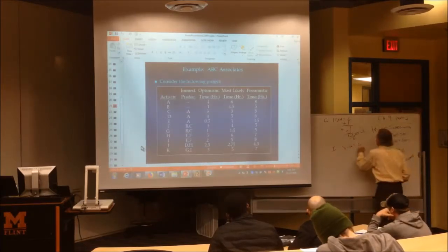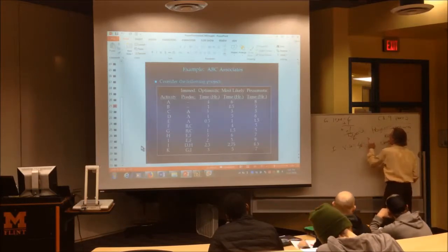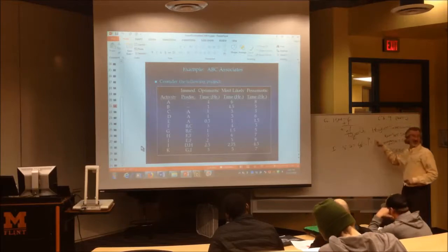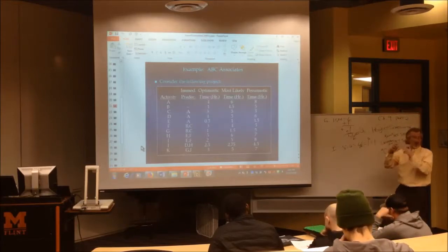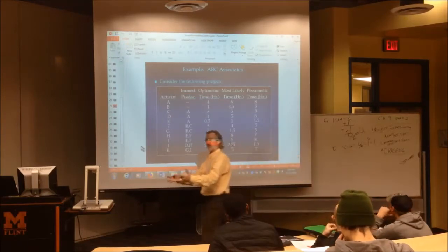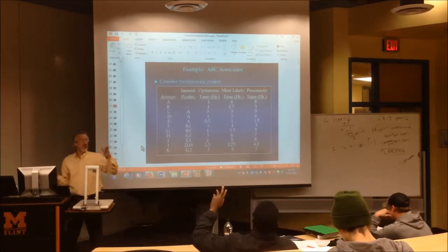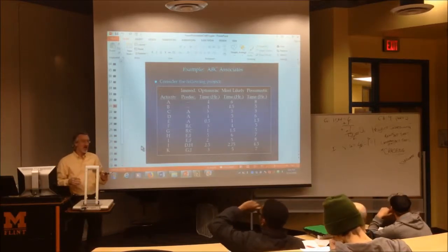Divide by 6. 6 divided by 6 equals 1. Next step, square it. Equals 1. The variance for I will be 1. Those 2 steps are the first 2 steps, well, for sure the expected time, before you can go on with this problem. But you will need to do variances, but I want to save you time.